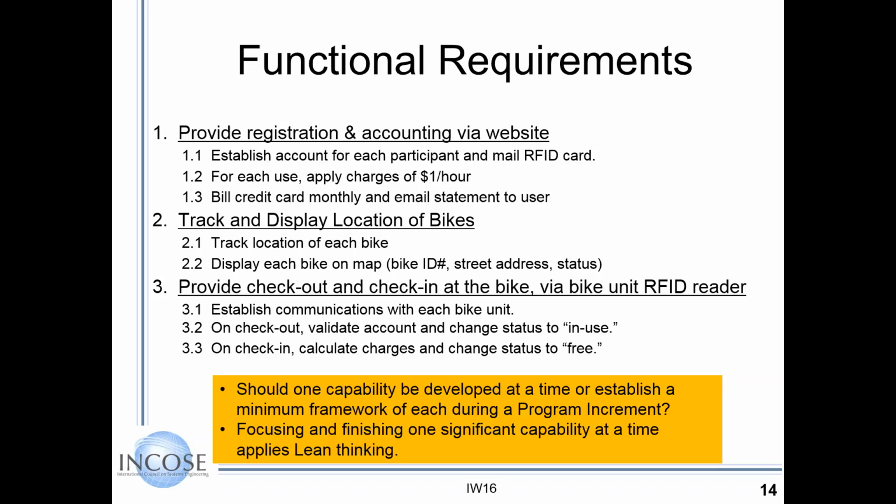In the increment or phase we would time box, and the value of time. You don't get into that analysis, which many engineers can do, where you keep thinking about it and doing more research. You have a time when you know you're going to demonstrate, so if you're doing a trade study, for instance, you find the highest valuable thing, and then build something.